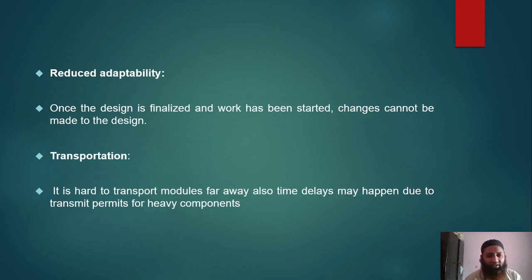Reduced adaptability: once the design is finalized and work has been started, changes cannot be made to the design. As I had told you, once it has been designed, changes can't be made later on. So whatever is being done has to be pre-planned beforehand only. Then only the work should be started. Once on site, after some things have been casted, if you want to change some units, that can't be done after the design has been finalized.